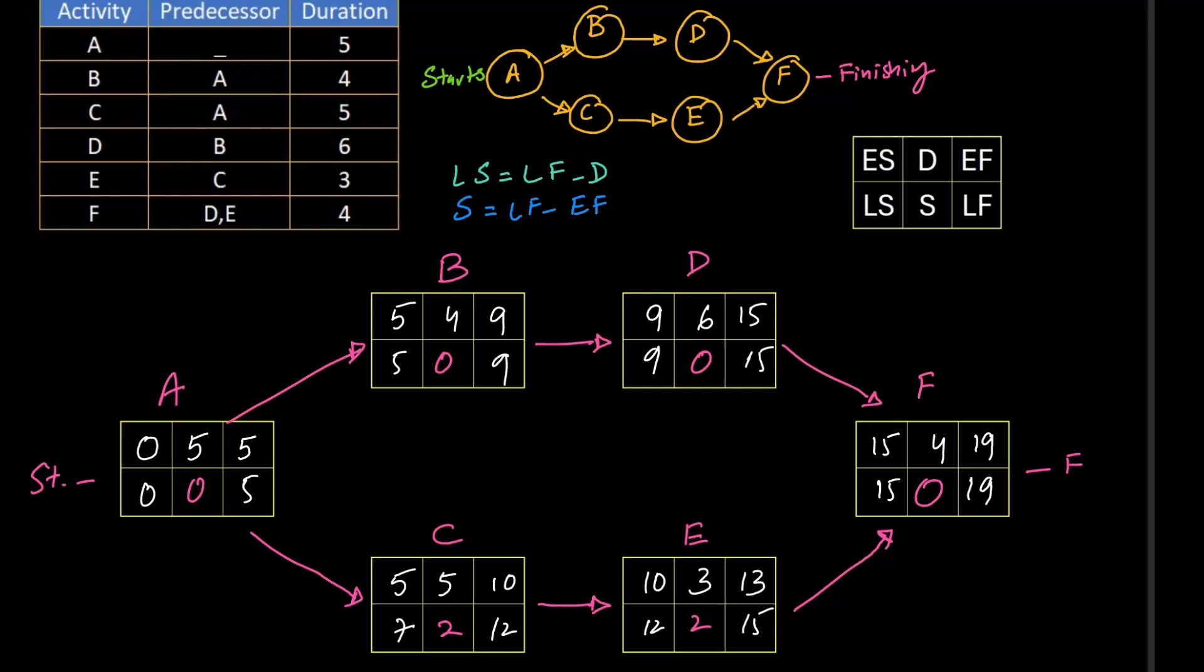On the other hand, if there is slack, like C has a slack of 2, means it can start on week 5 or week 7. Similarly, it can end on week 10 or week 12. E has a slack of 2 as well, means it can start on week 10 or 12, or end at 13th or 15th week.